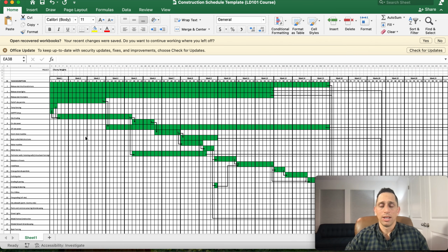For the wet utilities, certain valves, gate valves or butterfly valves or whatever, if they're a specialty item, those might be long lead items as well. If your community requires a pump station, there could be so many things that are a long lead item. For instance, in this example here, we had a long lead item that looks like it's taking 15 weeks, right? But by knowing that, you can do that right from the get-go once your project kicks off. You can get that clock ticking so you are ready for it, and it's not going to be a surprise when you get to it and you say, "Hey, okay, we're ready for this trade. Let's get them out here."